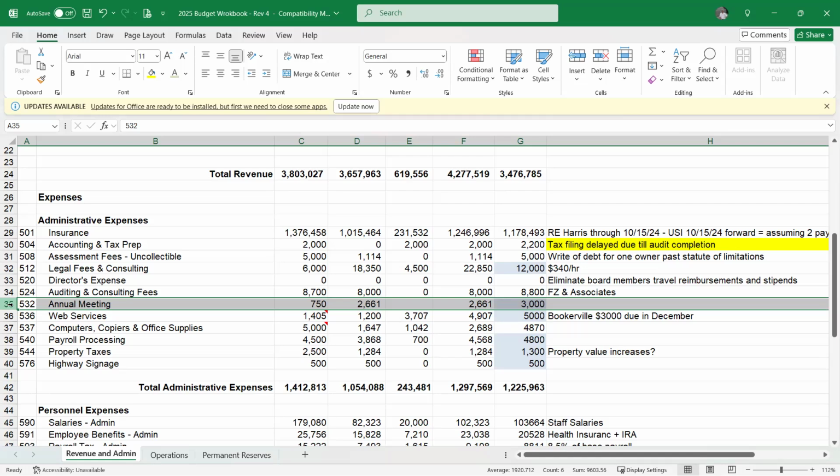Okay, because it seems to me if our total cost of that meeting is closer to 7,000 and we just happen to have some sponsors underwrite a few elements of the meeting, then either we need to have people assigned to developing those sponsors so we are not in a fire drill mode like we were this year, or we need to put the total cost of the meeting up there. And if we get sponsorships that lower that cost, then all the better, we'll come in ahead.